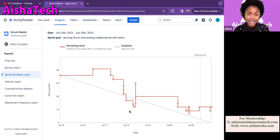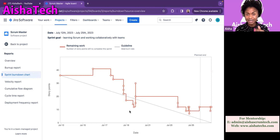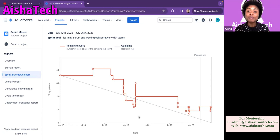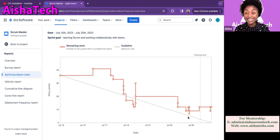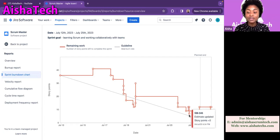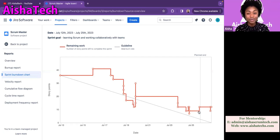But halfway through the sprint, they started to add more work again. I can see why there was no issue with this scope change — looking at the chart, they were almost halfway through their backlog. It's good practice that they didn't sit idle but instead added to the sprint to take on more tags. They did a wonderful job. Then there was a flat line, then they started closing tags again. Close to the end of the sprint, they added again to the sprint — that was okay, but they should have done better since the sprint was coming to an end. At the end, this team did not meet their goal because the red line never reached zero. They had around a 10-story-point spillover.